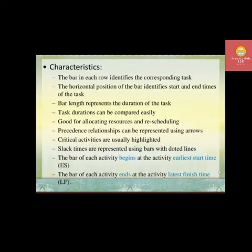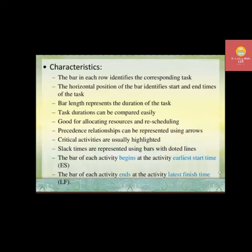The characteristics of a Gantt chart: the bar in each row identifies the corresponding task; the horizontal position of the bar identifies the start and end times of the task; bar length represents the duration of the task; task durations can be compared easily. It is good for allocating resources and rescheduling. Precedence relationships can be represented using arrows, critical activities are usually highlighted, and slack times are represented using bars with dotted lines.